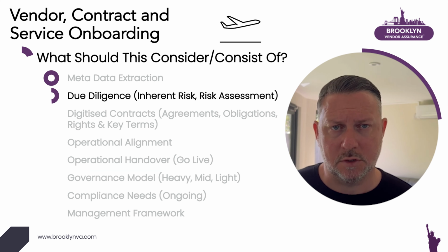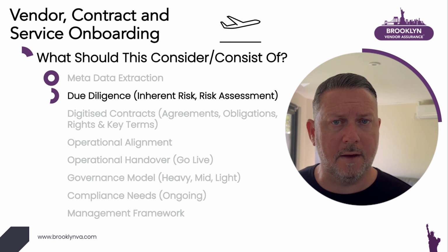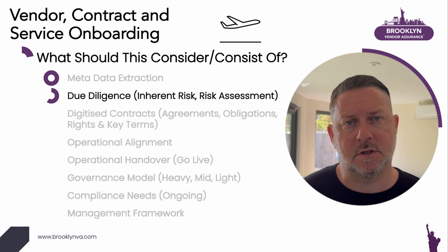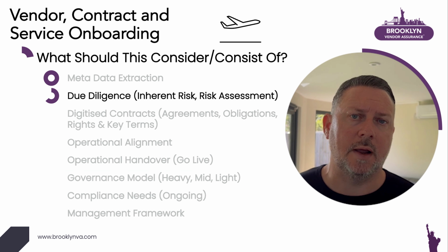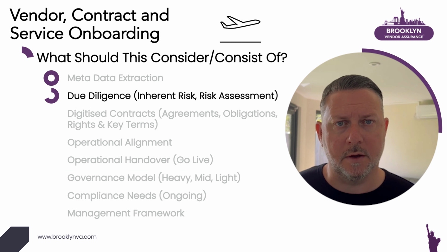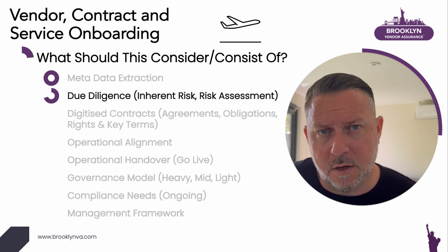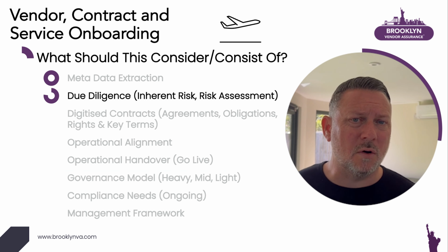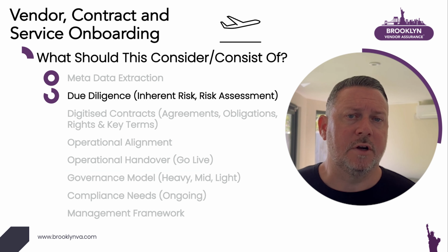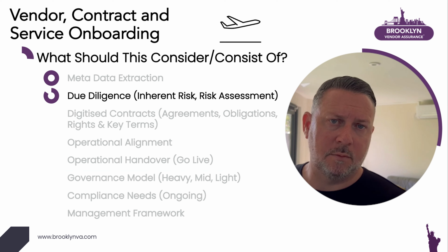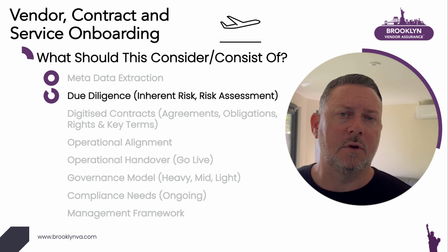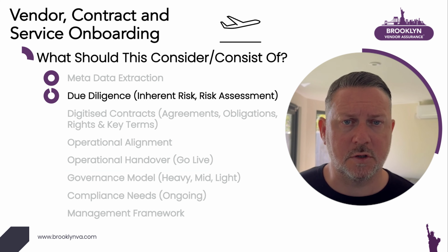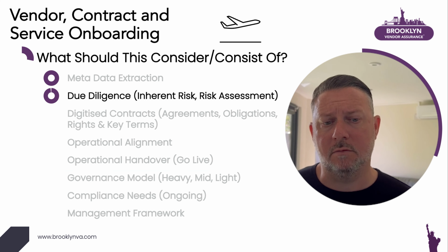That should carry across into some kind of risk system or risk log out of that pre-sourcing process. Coupled with that, closely aligned, is the risk assessment of the supplier or vendor. So how they operate, how financially stable they are, where they operate, all those key questions that you need to do at the time of onboarding. That needs to be stored somewhere, because in a lot of cases, you will need to periodically refresh that data. And if that's stuck in some sourcing system, when you come to do that, it will be a pain. So that needs to be brought out into the system you're going to use to operationally manage the contract in life, or the arrangement in life.